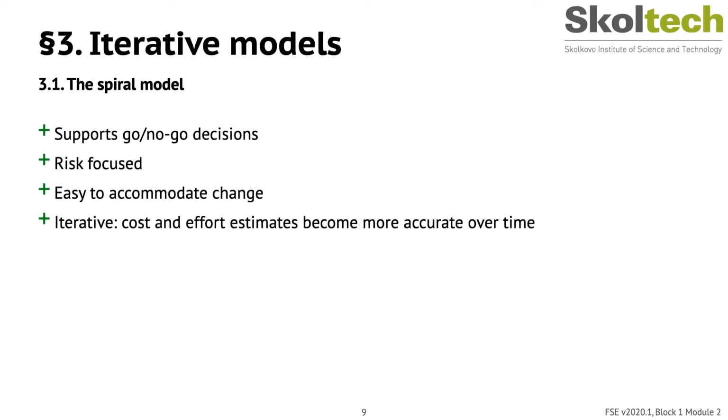However, the following list summarizes some of the spiral approach's biggest disadvantages. It's complicated, which isn't always worth the effort, particularly for low-risk projects. Because it's complicated, it often requires more resources than simpler approaches.